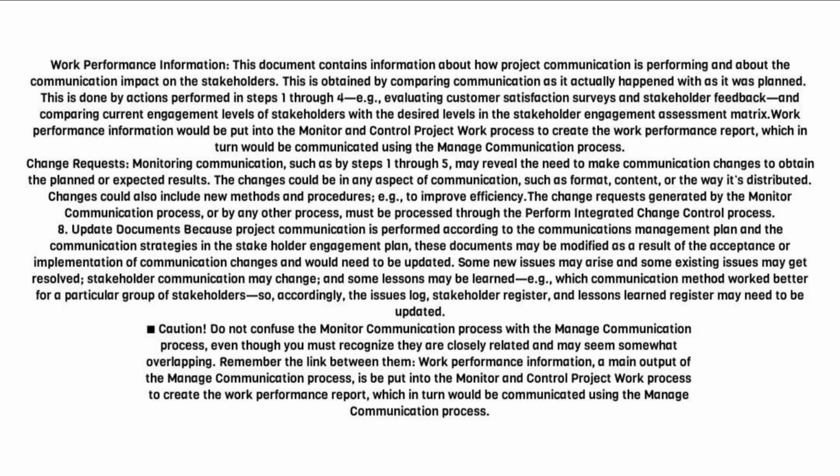Some new issues may arise and some existing issues may get resolved, stakeholder communication may change, and some lessons may be learned, e.g., which communication method worked better for a particular group of stakeholders, so, accordingly, the issues log, stakeholder register, and lessons learned register may need to be updated. Caution! Do not confuse the monitor communication process with the managed communication.